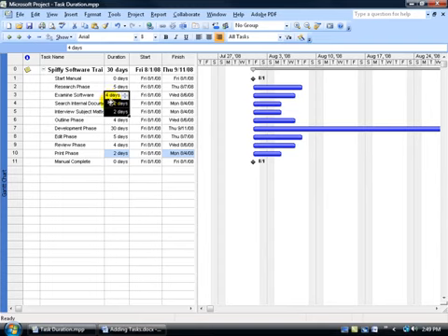What's the longest task here? 4 days. So by default, when I do convert this, it'll say 4 days is the summary for all these 3 subtasks down below. So for right now, to keep it simple, I've added some of my summary tasks, a few detailed subtasks, and I'm typing in all the days, and then when I get a clear vision or I get more feedback from other managers and resources, then I'll go ahead and update this, and then when I'm ready to go, I'll move on to the next step and start creating outlines here.